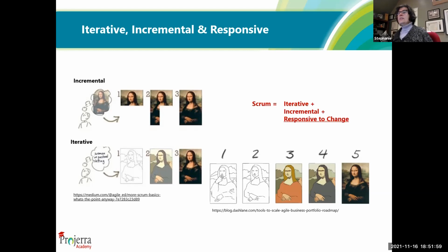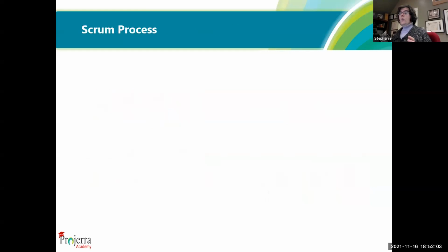Now let's talk a little bit about some of the key elements of working in a Scrum team. What is that Scrum process? There's a product backlog. This is the entire shopping list of all of the requirements that are known today, but they are prioritized with the most important ones, the ones that are most well-defined, that are perhaps next through implementation, sitting at the top. The ones that are just figments of imagination are sitting at the bottom and they're just a one line. They have no detail other than the thought.